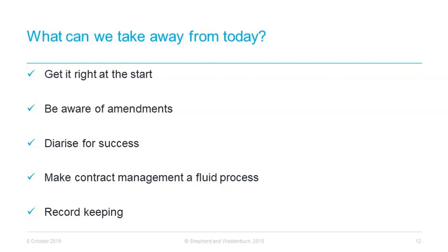The availability of records can have a significant bearing on the outcome of cases, so it is essential to maintain an accurate and full suite of documentation. For example, a record of emails sending payment applications or notices will be one of the first things your advisor will look for and ask for when they're looking at your prospects of a smash and grab adjudication.